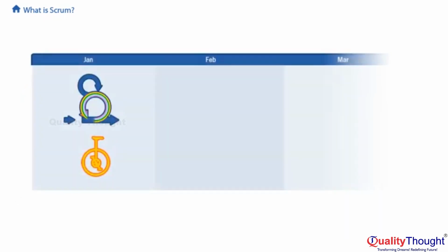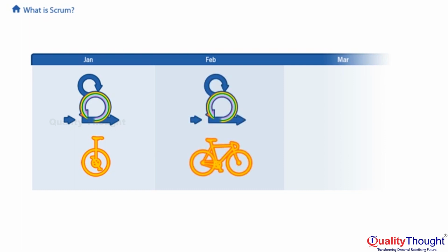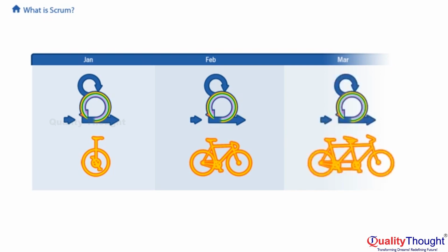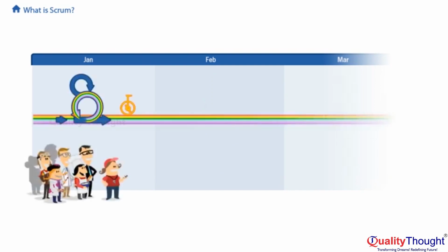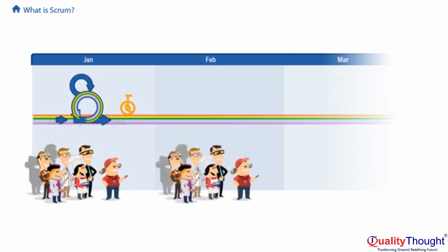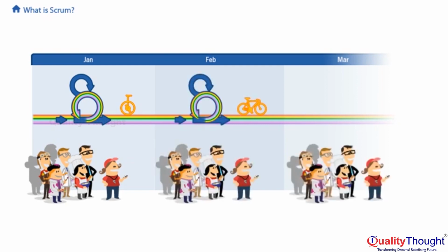Right from the first sprint, a Scrum team tries to build a working, tested, potentially shippable product increment even if it starts out small. Every sprint, they demonstrate what little bit of shippable product they have to everyone. Customers often need to see the wrong product before they can specify what they really need. With short iterations and more feedback, we have a better chance of discovering the right product. While the product owner doesn't actually have to ship every sprint, it's the team's job to make this possible. To make a shippable product every 2 weeks, we're going to want people with skills in testing, in design, in business requirements, in coding, all in one cross-functional, self-organizing team.